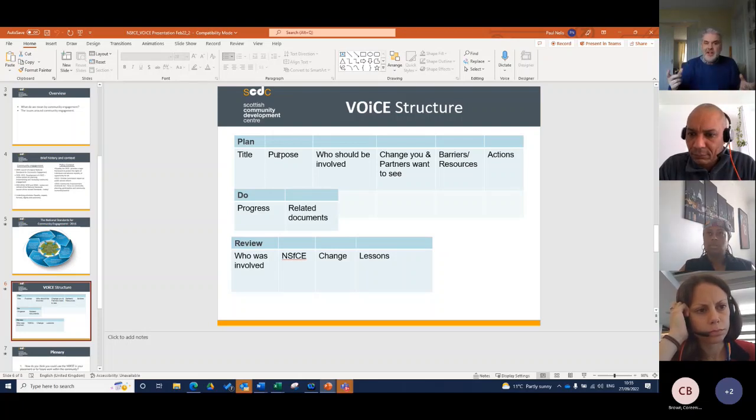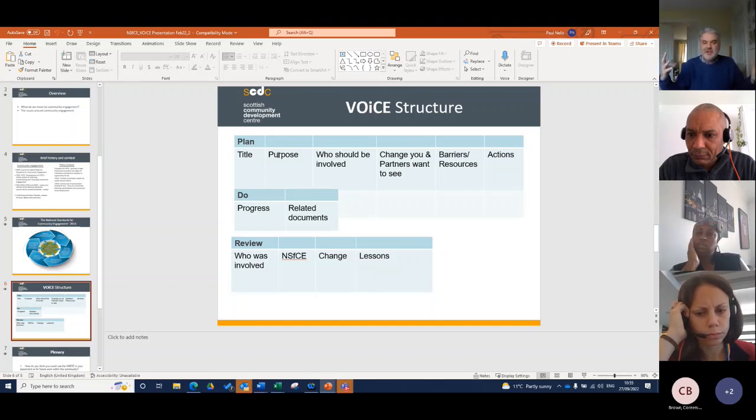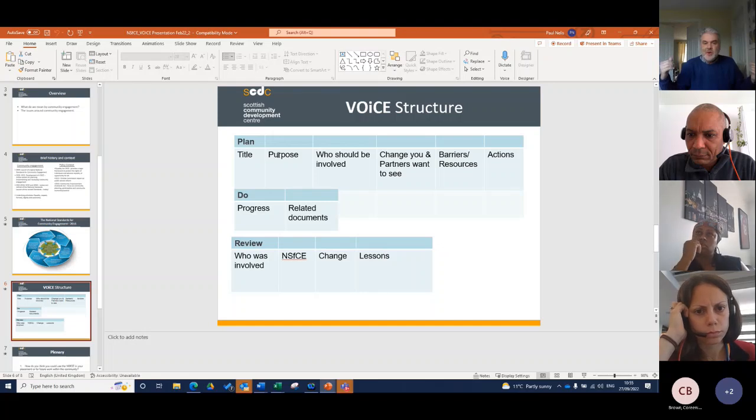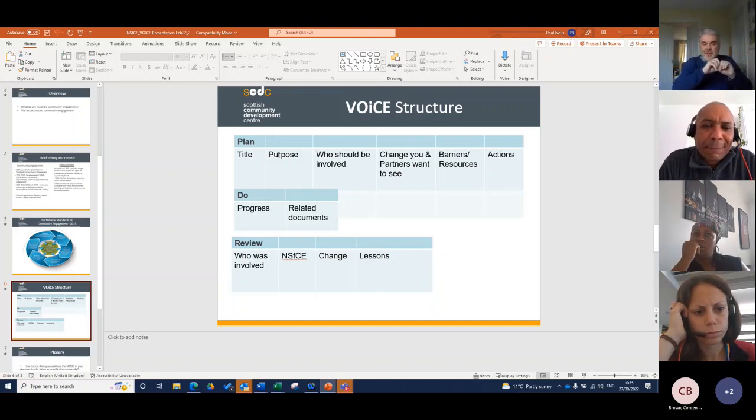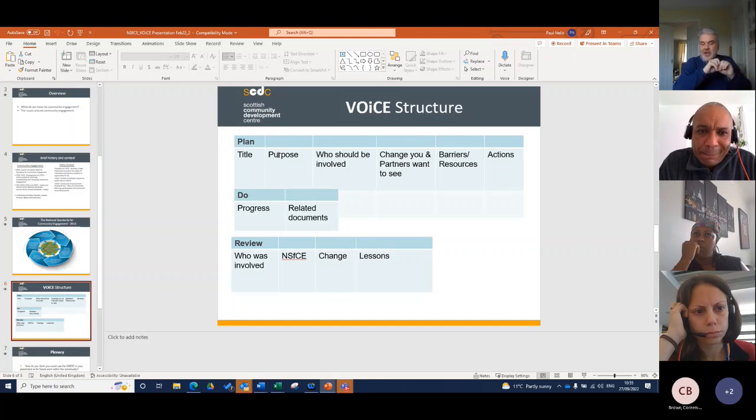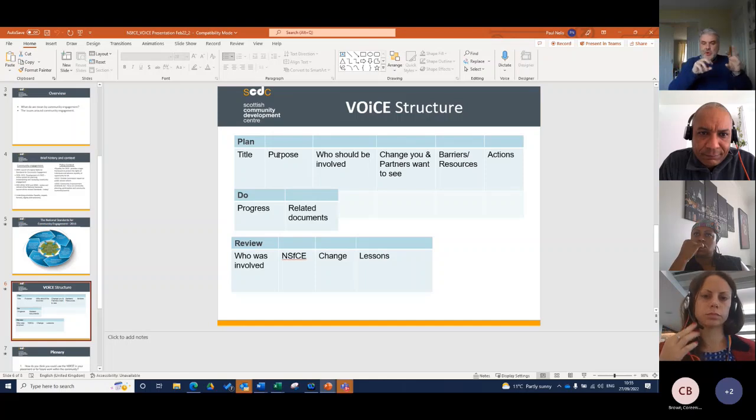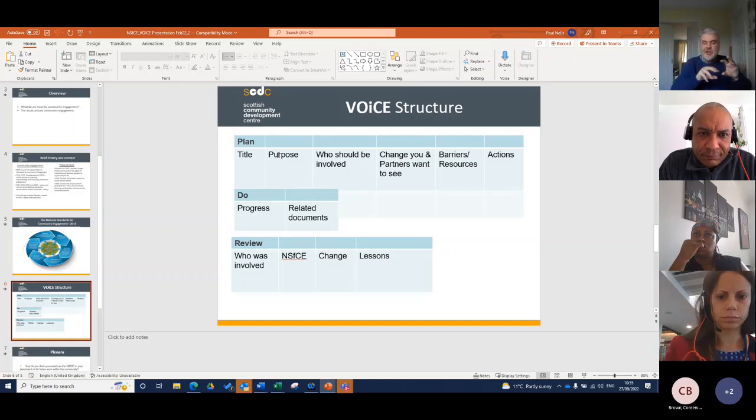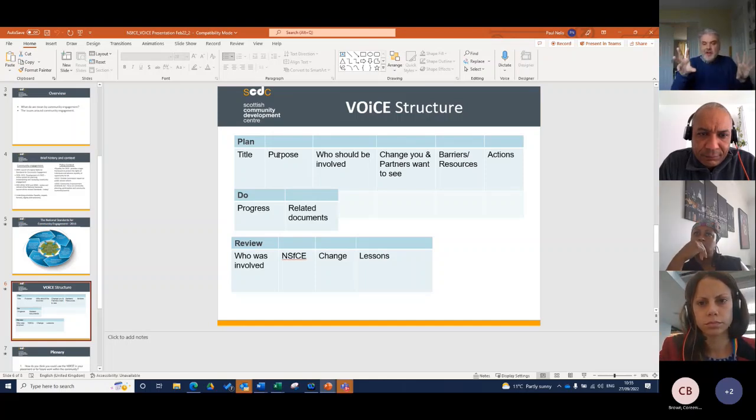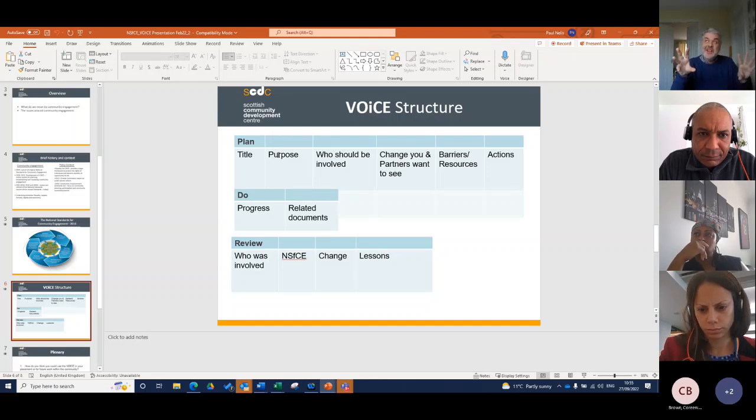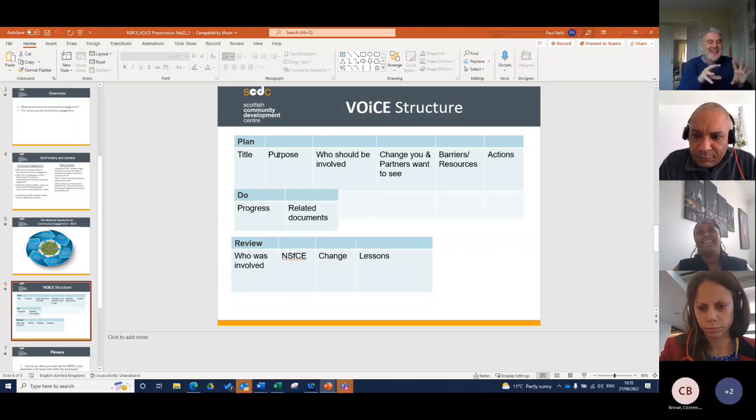The Do section is, as that plan is happening, it's going to take you three, four months to put this stuff into place. In February you're going to have the questionnaire out there. Then in March, April, you're going to be thinking about those focus groups, bringing those groups together, hearing people's stories, how you're going to collate that information. In May, you're going to have that bigger meeting with the stakeholders.